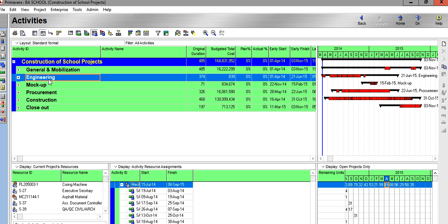the project. So any missing item we can raise to the tender. We have to make sure that the detailed scope is provided because during the Primavera program and preparing the schedule, detailed activities are required to complete the program. So we have to make sure that the project has complete detailed activities as required by the project.